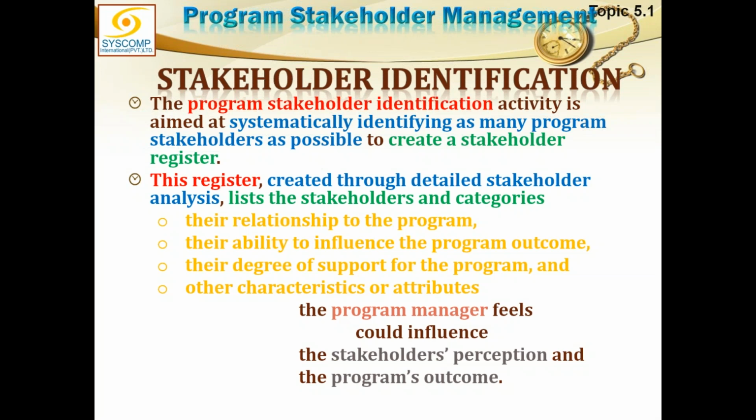By the way, the analysis comes a little later, but the register does exist. The mere name of various stakeholders could be the very first entry into the register. Later on, when the analysis is carried out, the results are also updated into this register, and ultimately you are better armed to decide what to do with the stakeholder.